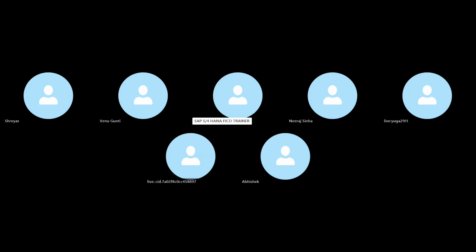If tomorrow is a manual activity, 2 days before I have to align the guys, please be available tomorrow at so and so time, because sometimes the client is opened only for this time to this time, that is known as window opening. Only in this time can you maintain the cutover activities. After that it will be locked, you cannot modify anything. So maintain everything in the Excel sheet, every detail in proper sequence.